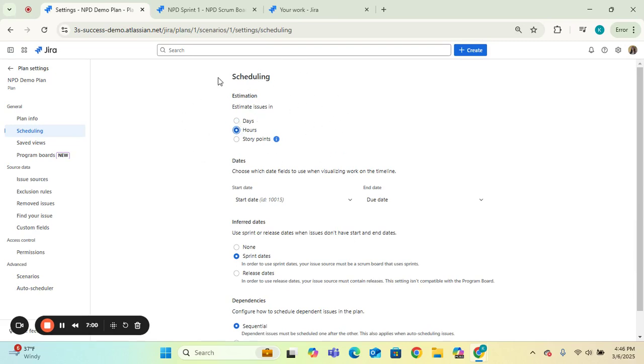In one of my last videos, I went over how when you set up a Jira project, it's important to always select a Scrum project, even if you decide to do Kanban later. And that's because if you do not select the Scrum project, the estimation field here and being able to change that or even use an estimation field in your plans is not available. And that's something that is such a massive limitation and is crucial to the success of projects, having been a former project manager for over a decade myself. So that is what's really important, and that's how you can change the estimation, right?